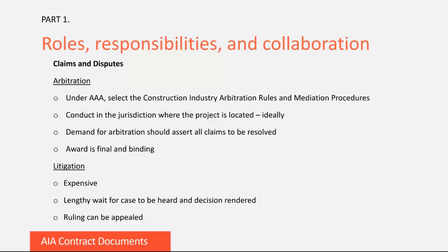However, like mediation, the final decision can be enforced in a court that has jurisdiction. One point to note, because this does come up in practice: if the parties in their contract agreed to arbitration as their form of binding dispute resolution, but disregard it and file their claim in court, a judge will not hear the case, but will compel the parties to resolve their dispute via arbitration in accordance with their contract.